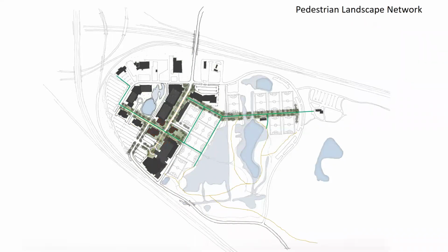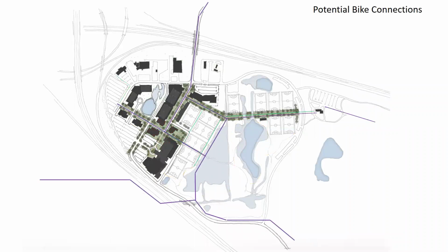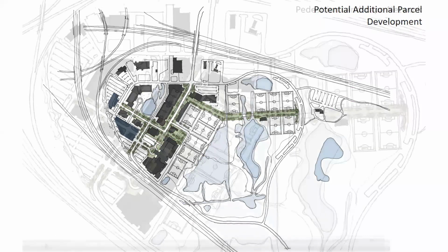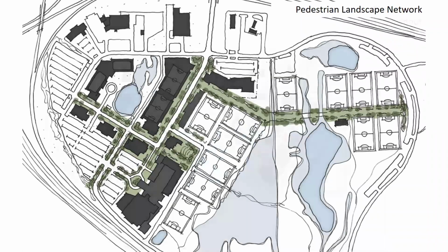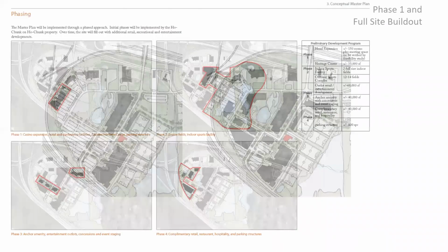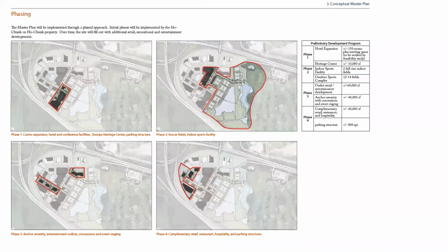The pedestrian networks, bike paths, all of these items reinforced the one simple goal of where is this cultural facility going to be. And this area was looked at from a 25-year standpoint, that there would be 4 phases. They would each reinforce the other and would build incrementally on the site.